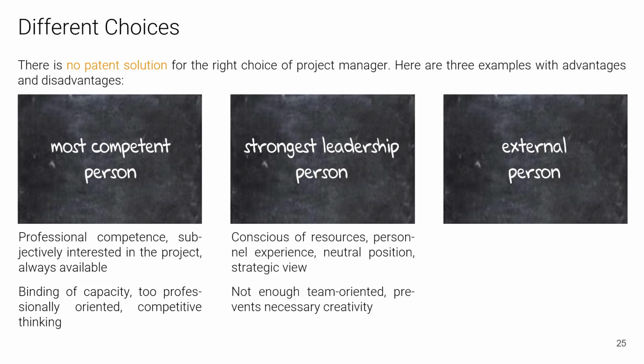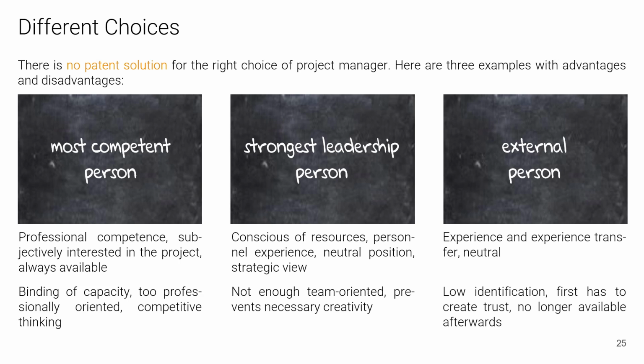If we look at the person with the most leadership skills, he or she may be neutral towards the project, have a strategic view, be sensitive to resources, but may not be team-oriented enough. This again creates problems in stimulating creativity because the person may not be able to assess whether the solutions are good or bad and may put more emphasis on his leadership position. If we bring in an external person as project manager, he or she brings experience and is also neutral towards the project. However, he or she also has little identification with the project, must first create trust, and may no longer be available after the project.